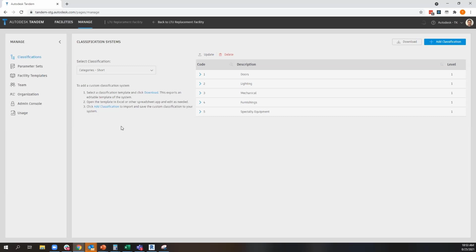So I will say we follow the asset information requirements defined in the ISO 19650 Part 3 spec. And the idea there is, you have a project information model, and there is a handover point in time to pass that data into the owner operator's asset information model. And as the team is appointed, as you bring on the design entities, the architects, engineers, and contractors to contribute, this is a discussion facilitated by that delivery team to say, this is how we expect to deliver these things, and this is the data that we want for these different categories or asset types.